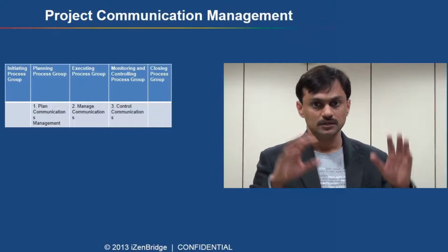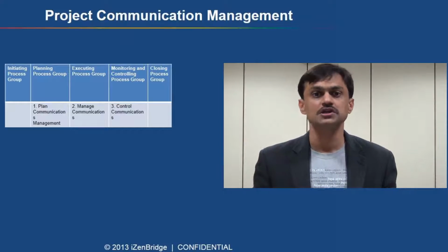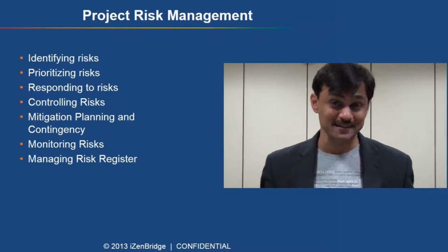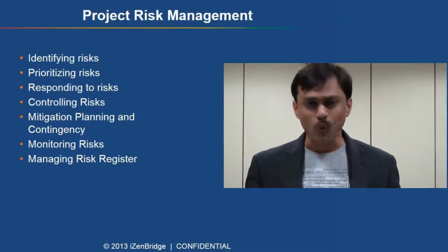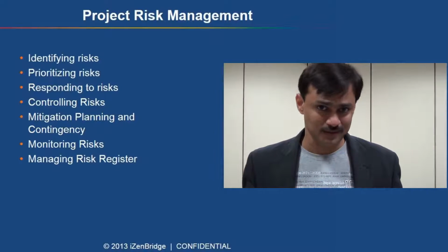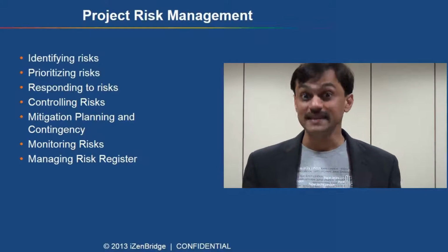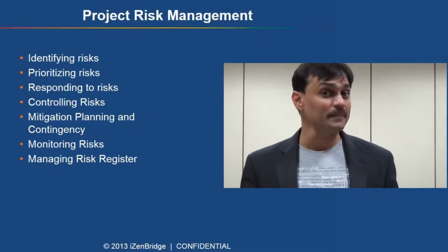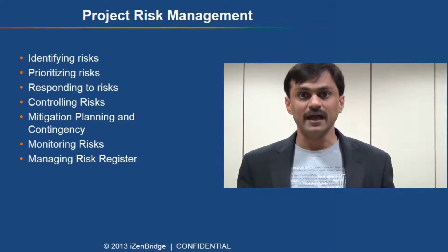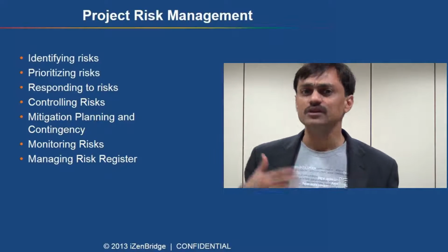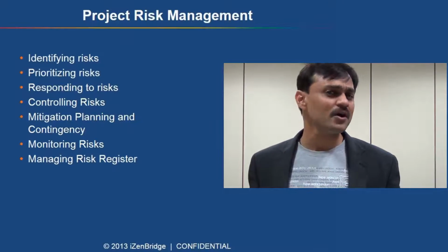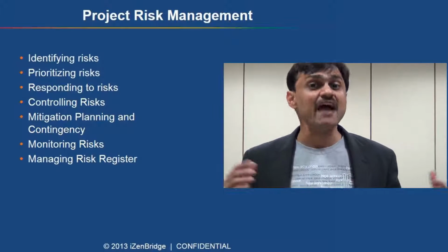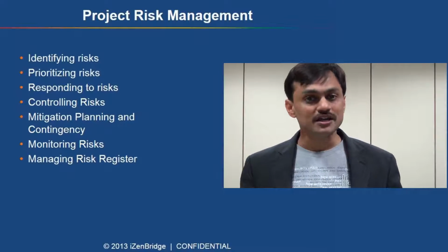That's a relatively big topic, but the top idea is all communication related activity happens in the project communication management knowledge area. Project risk management. Now whatever we plan, whatever we do, there will always be a risk. Now this knowledge area talks about, yes, we need to identify those risks, make some repository of it, prioritize them on the basis of their probability and impacts, do some responses and monitor, continuously review your risk management process. So skills, tools and techniques which are needed for managing project risk efficiently fall under the project risk management knowledge area.